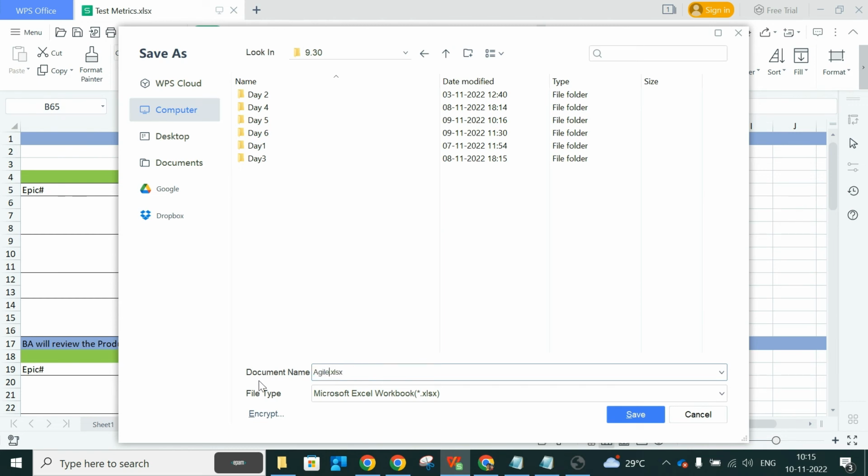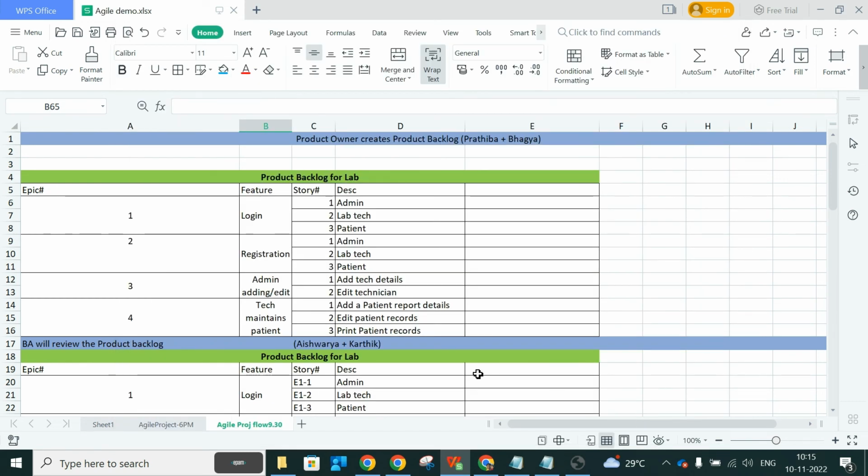No, no. If that is not a very critical thing, which is not breaking your system or which needs to be addressed first, right? That should be fixed in sprint 1 itself. You should not push to sprint 2. So, if it needs to be pushed to any sprint, that will be again created as a feature and put in your product backlog. Yeah. Then obviously they'll be pushing it to the next sprint.